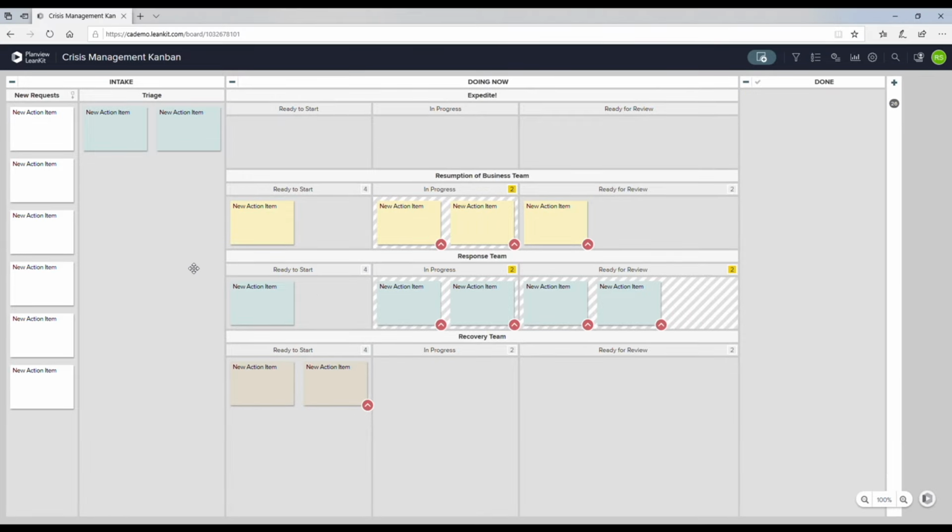Next, we're going to spend some time talking about the expedite lane. Now in Kanban, there's something called class of service. And class of service is a way to talk about the global priority of work in relation of one item to the other. Typically, the two that we see most often are standard work, which is normal and high priority items that are coming through to the teams already, and then something called expedite, which is reserved for the most critical items, the stop-the-press moments, respond-now moments. Kanban creates a path for those when they hit to come through the board and get